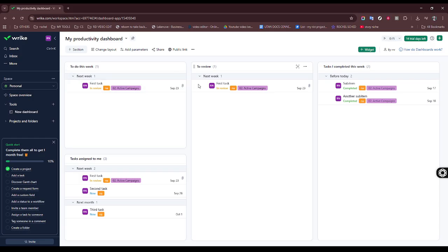As your board and templates come to life, you'll need to focus on managing sprints. Sprints are short, iterative cycles within your project during which a specific set of tasks are aimed to be completed. To manage these efficiently, estimate the amount of work your team can realistically achieve in a designated time frame, usually spans of 1-4 weeks. It's vital to hold regular sprint reviews and retrospectives. These gatherings ensure that everyone is aligned and can offer insights for future improvements, making your process fluid and responsive to change.